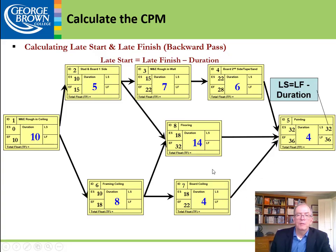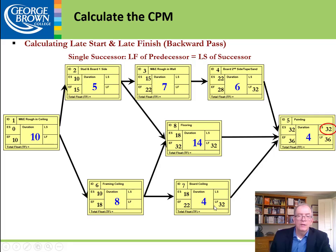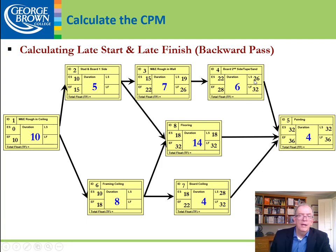Where activities diverge going backwards, that late start of 32 gets populated into the late finish of the diverging activities — the 32 goes into the middle activity and the bottom activity. We continue subtracting: 32 minus 6 gives 26, 32 minus 14 gives 18, and 32 minus 4 gives 28. Those numbers populate in.